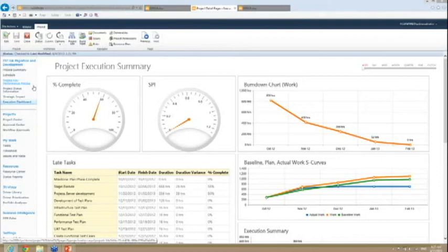and late tasks. When you are on lessons learned, when your project is complete, you might be interested to see what your variation was for the tasks, and which tasks were late, to perform some analysis and make corrective action for your next project for estimation, to decide whether we need higher level estimates or more detailed schedules, so we are right on track.